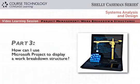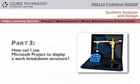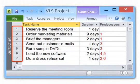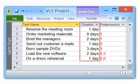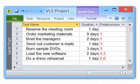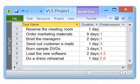Microsoft Project is a powerful application that can help you plan and manage projects, large or small. In Part 3, you'll learn how to use Microsoft Project to display a work breakdown structure. Here we have entered the seven tasks. The program numbers each task and provides columns for duration and predecessor tasks. The result is a work breakdown structure, which will define the project and generate a variety of charts and reports. You'll learn more about project management concepts and skills in the sessions that follow.